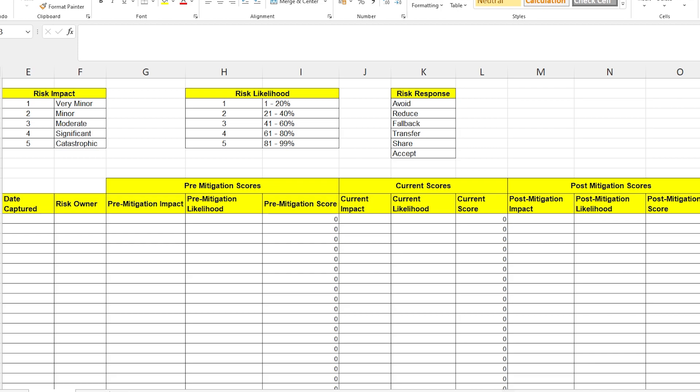Okay, now we're into the risk scores. This is the part that always gets interesting. You'll see that I've created three categories here for different points in the lifetime of the risk. We've got the pre-mitigation scores, which are the scores of the risk as soon as it was identified. Then we've got the current score, which, after you've been mitigating this risk, hopefully the impact or the likelihood score is going to start to drop. And then we've got the post-mitigation scores.